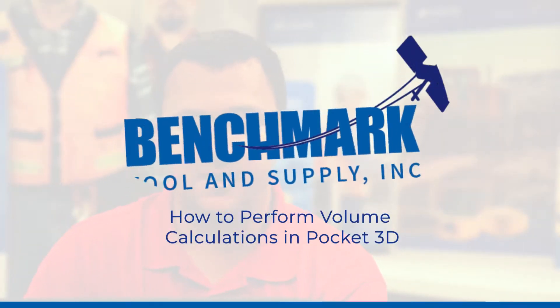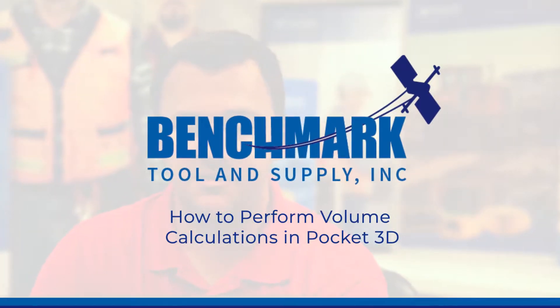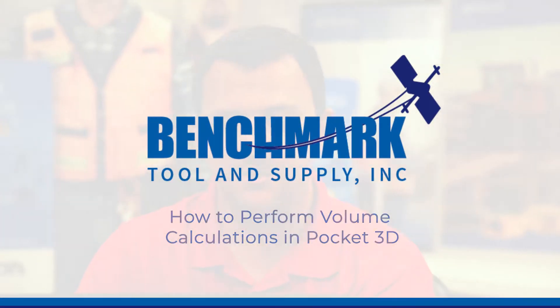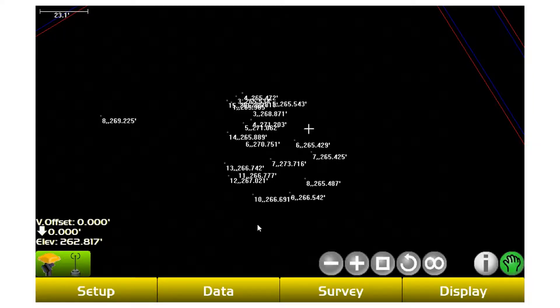So in Pocket 3D, what grading contractors have been using it for lately is for volume calculations. Week-to-week basis, you can take cut fill reports, progress reports.